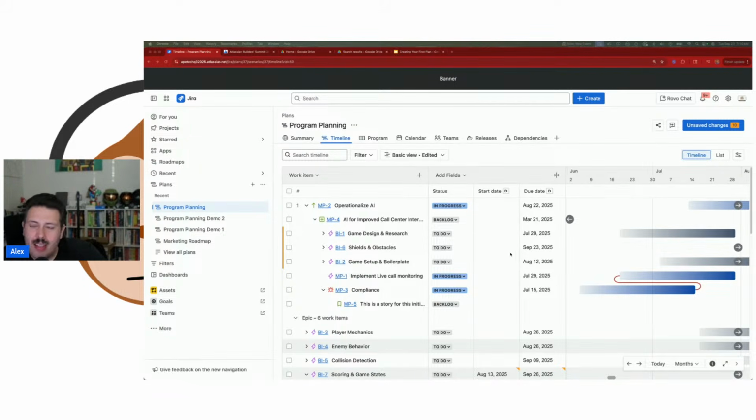When you go to reassign things to different people or move all the dates, you're messing with the plan, and you don't want to mess with the plan, because until contracts are signed and there's ink on the paper, those what if scenarios are just what ifs. They're just possibilities. They're not something that's actually going to happen, or at least might not happen. And so Jira gives us the ability to create these scenarios that allow us to experiment. They allow us to try different hypothetical scenarios to see how schedules are going to slip, or resources are going to have to be utilized and whatnot. So that, my friends, is what the scenarios are for.